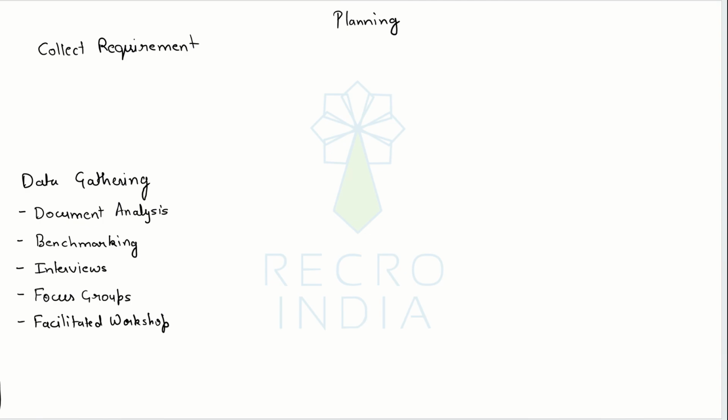Like you have two people from IT, one from HR, two from operations, one from procurement, one from maybe quality, and you all sit down in the room, discuss what can be the possible set of requirements, what can be done, what cannot be done, and certain overlapping requirements and certain conflicting requirements can be discussed with the group.